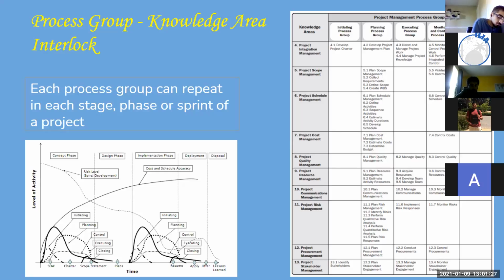That's correct. A common mistake that a lot of people make, even really experienced project managers, is they don't close the project. They just deliver the stuff and everyone assumes that it's done, and they never sit down with their client and actually sign off and close it. And what happens is the project remains open. It just is lingering out there, draining cost and resources sometimes. Or if it's not draining any resources, it's just giving your client the impression that your work never completed.